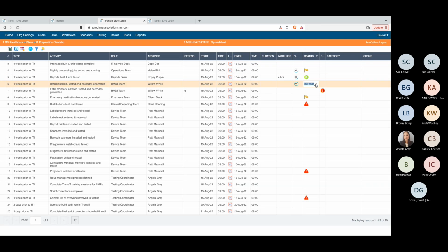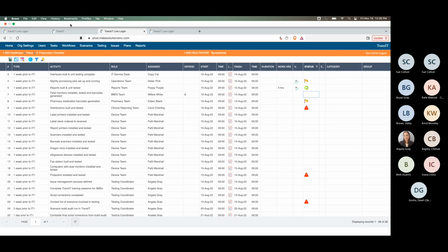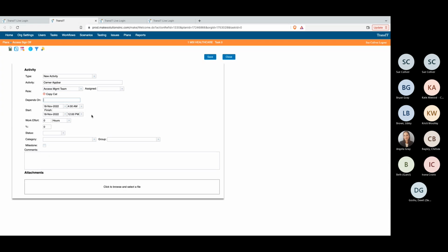Once it is completed, then you can see there's no longer a step or a stop or dependency for this row. This had to be done first. Number 6 had to be done before 7 could be completed. So when you're completing your activity, you can indicate a numbered step that is dependent first on completion of this specific activity. We will continue on. We'll leave it blank for now.